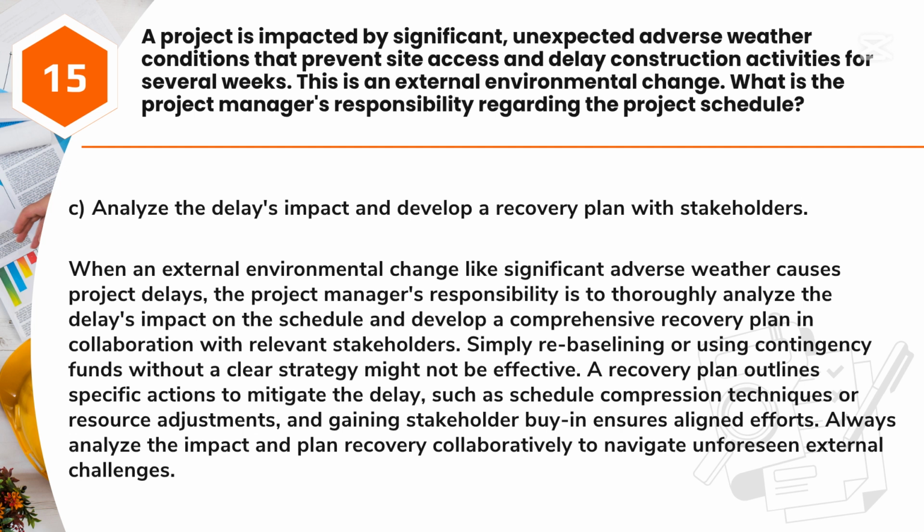Simply rebaselining or using contingency funds without a clear strategy might not be effective. A recovery plan outlines specific actions to mitigate the delay, such as schedule compression techniques or resource adjustments, and gaining stakeholder buy-in ensures aligned efforts. Always analyze the impact and plan recovery collaboratively to navigate unforeseen external challenges.